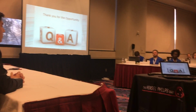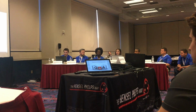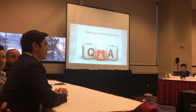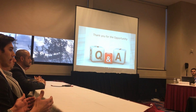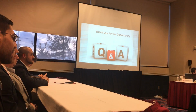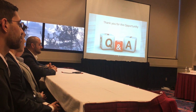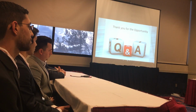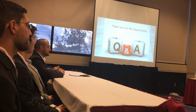Okay, and then one more. I know you guys mentioned it earlier, but you didn't quite specify. The 3D mock-up, if it didn't work in the model and you had to build it, where would that money come from? We wouldn't build a full physical mock-up because we don't see it as beneficial. We'd do part of it, maybe an exam room, and include all the features in that room. That still costs money, right? Right. So at best guess, where would you pull that from? To answer your question, since it's a mock-up that's in the best interest of us and our client to develop, for us to take the hit on that cost, it's not a bad cost, it's an investment. So we would take the hit on it.